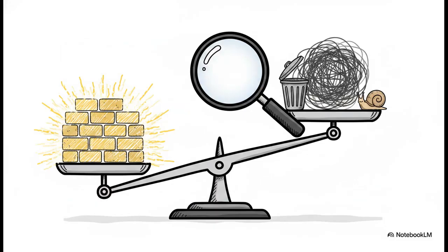What makes VSM so powerful is that it forces us to be ruthless about categorizing our activities. On one hand, you have value-added activities, the actual work that drives the project forward. On the other hand, you have MUDA, which is the non-value-adding waste. Now, in complex projects, MUDA loves to hide in plain sight. We're talking about approval lags, waiting around for requests for information, staging materials twice because of site constraints, or dealing with redundant communication. VSM acts like a giant magnifying glass to expose all of that.